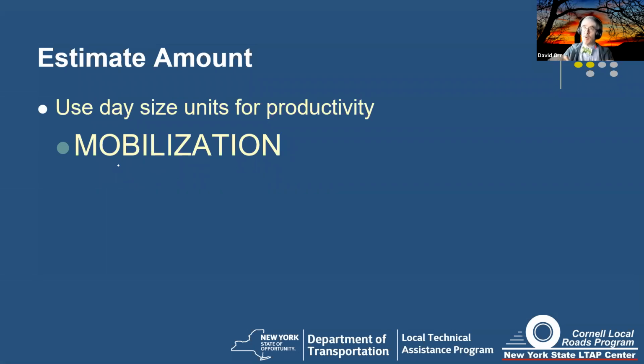But for most municipal work, we can figure out by just doing a day size unit what the costs are, and mobilization gets built in. But remember, that means you include the cost of the entire day for the crew. Now, in the Q&A pod, somebody says, is your crew unit if you're working in-house? Yeah, that's part of it. You're using your own in-house forces, and that's the labor and equipment part of that MILE acronym.